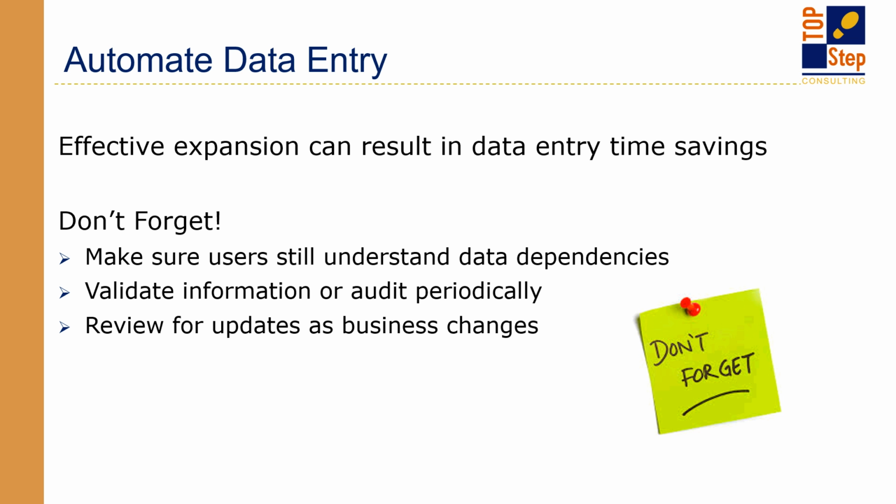So one thing you've got to remember is you've got to update for your business changes. Same way with cost rates. Cost rates change, let's be honest. Every employee usually gets a yearly evaluation. That means that most of the time they get raises, or you have a yearly incremental increase in your pay for inflation. So that means that your cost rates have changed. So you want to make sure that you're controlling that data. Integrations may propagate data errors to other systems, causing more administrative nightmares than benefits.